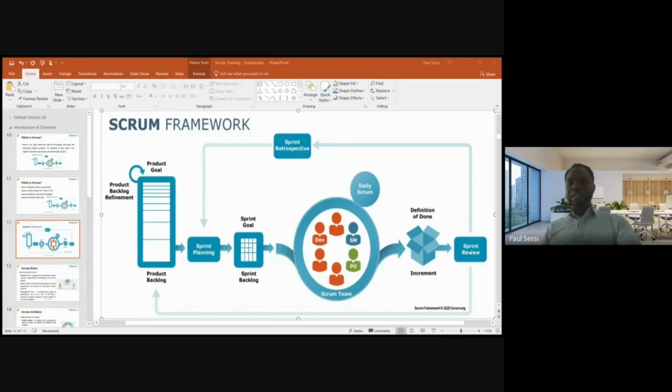So at this sprint review, you deploy, and then when you deploy as a team, based on the feedback you got from the product owner and the stakeholders that you have meeting with at this sprint review point, then you guys go back and retrospect. You sit down together, you look at what you didn't do well, what you did well, what you should continue to do as a team. And then you move from retrospective to the sprint planning. And then you go on like that.